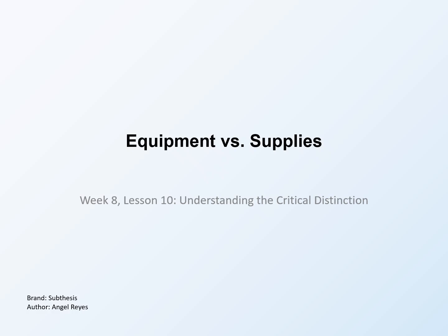The distinction between equipment and supplies is more than a budgeting technicality. This classification affects prior approval requirements, tracking obligations, and disposition rules at grant closeout. Understanding the distinction helps you classify purchases correctly and manage them appropriately throughout your project.